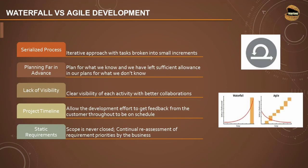In traditional models there was a lack of visibility, but in Agile there is clear visibility of each activity with better collaboration and transparency — putting activities in a common portal so everyone can see how things are progressing and where action is needed. Agile allows development to get feedback from the customer throughout to stay on schedule. Scope is never closed in Agile: there is continual reassessment of requirements and priorities by the business, accepting changes even late in the lifecycle to meet customer expectations.